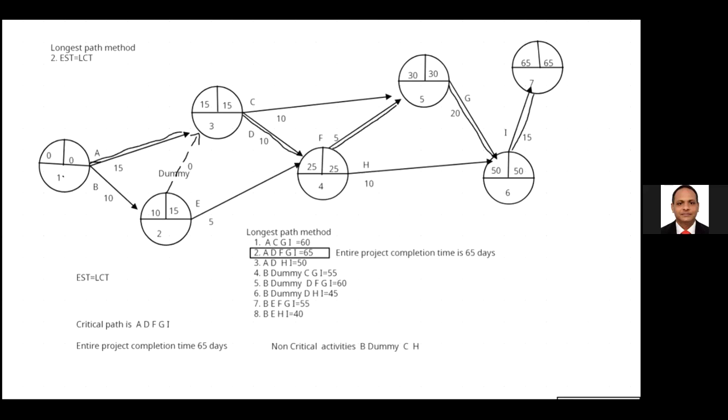If B becomes 13, the same critical path is not affected, and it does not change the early starting time or the latest completion time of the rest of the activities. If you delay B, just assume 3 days. We can't delay an infinite number of days, but to some extent we can delay without affecting the entire project completion time.